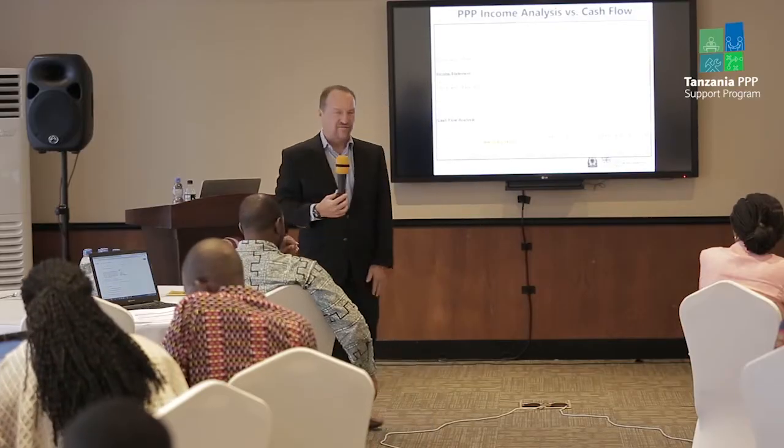Now we have interest expense. Interest expense is the interest on a loan of $75 million for a term of 10 years at 12% interest. So if you look at the formula here, you'll see that there is a formula in Microsoft Excel called IPMT. What would you guess IPMT stands for? Interest payment. That's your interest payment formula.